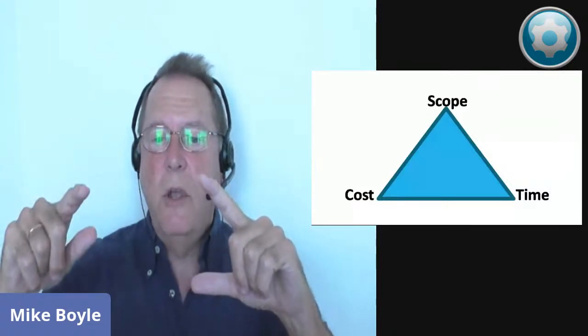Here, I'd like to go ahead and close the loop with this whole idea of benefits realization. And I suspect that a number of you are familiar with this diagram. It has various names. I call it the triple constraint, but I know that it has other names. And so we see that we have 3 components that are related to each other: the cost, the time, and the scope. So that means, as we know, being project managers, if the scope changes, that has to have an effect on the cost and the time.